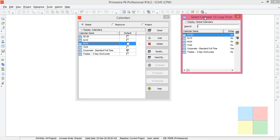It will ask you to copy one of the existing calendars. You can't directly create a calendar, you'll have to select one of the existing calendars.